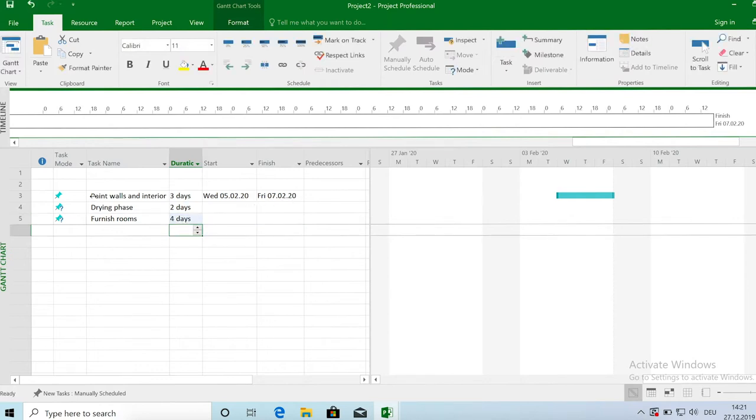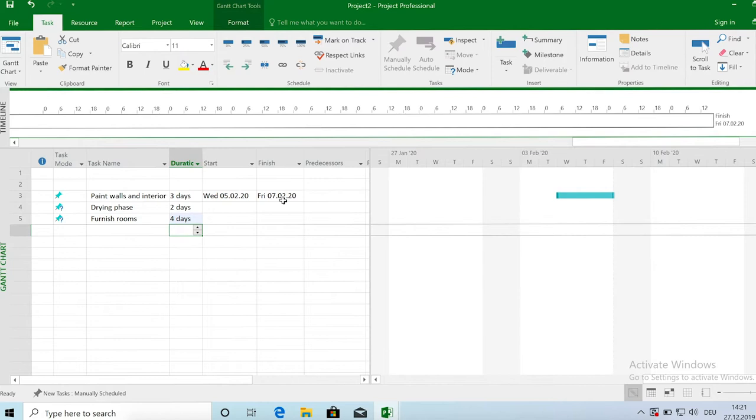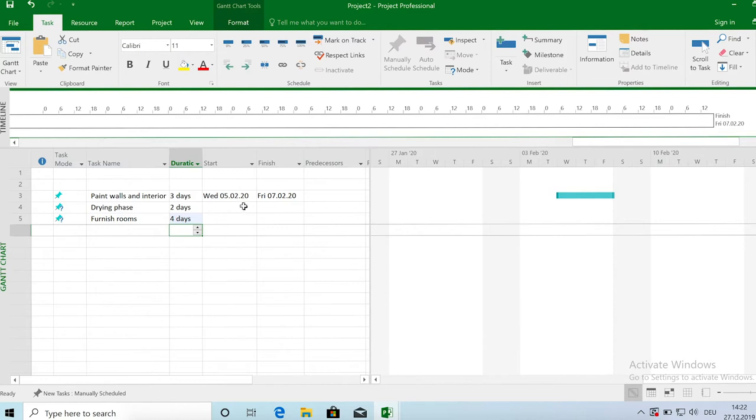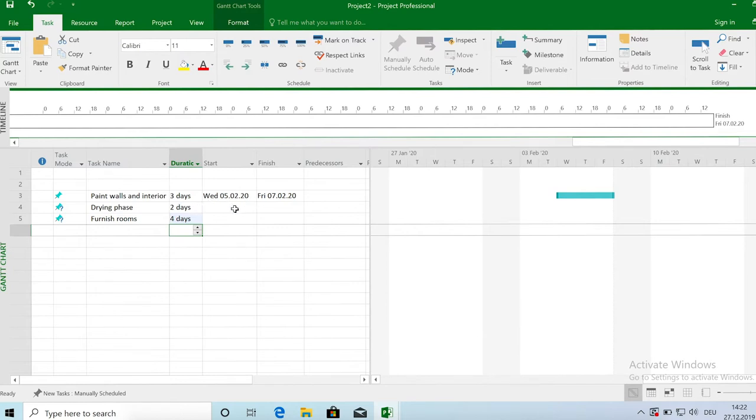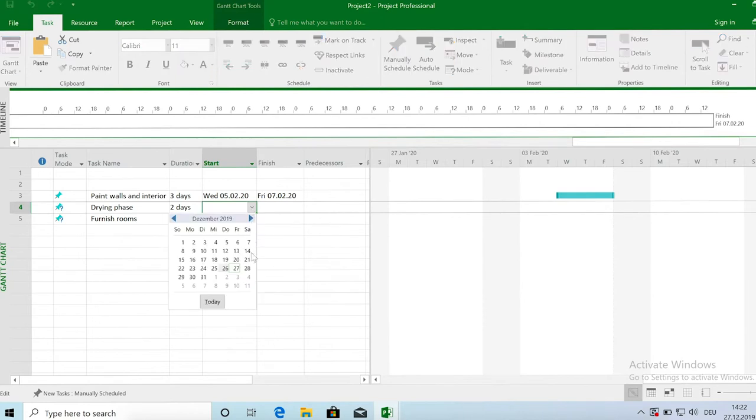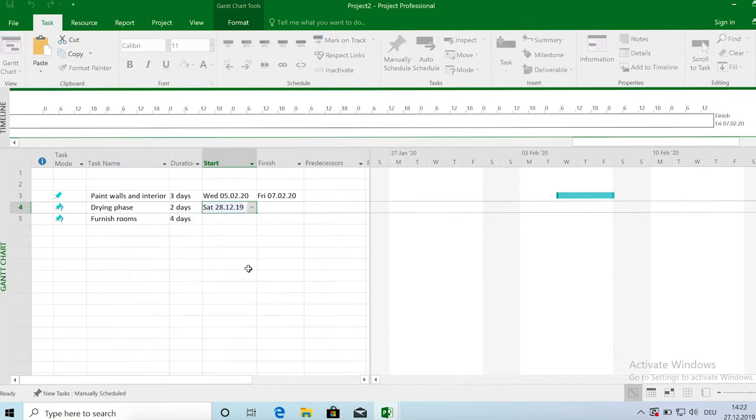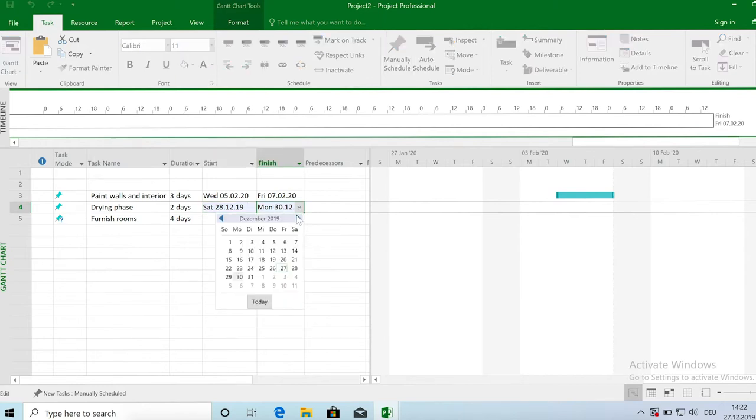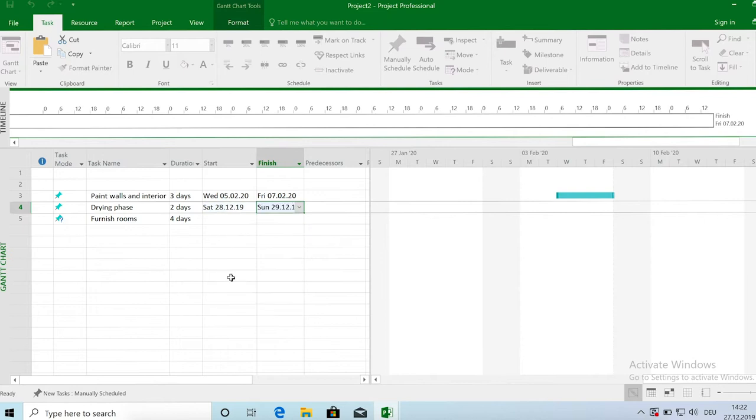Now by default Microsoft Project uses manual scheduling. So what this means is I can really choose when a specific task should start and when it should end based on the duration of the task. So the first task, the paint job takes us till Friday and let's say the drying phase now obviously has to come afterwards. So let's say this is then Saturday and Sunday. So now it assumes that there is no work on the weekend but this is just a dummy phase, dummy task basically.